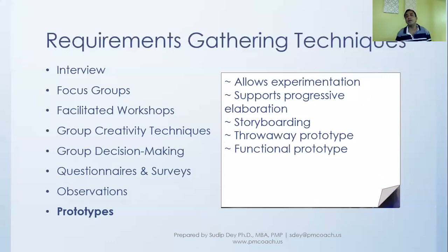For example, you might be developing a website, and so you first show the main skeleton, and they say, okay, I like this menu, and this is the home page I like. So you work on that. And then you move forward, and you show the next page, and they say, I like that, but I need more details, more features and functions, and you build on that. This way, from the prototype, you keep on growing it into the real product.